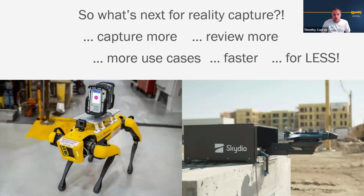If we can track installation progress and not only say the mechanical system is installed 60%, but we can say, hey, of that 60%, 10% have deviations at the warning level, 5% have deviations at the critical level. Then it gives us a better idea as to what is actually billable, and we don't spend money faster than we should, or our burn is actually what it needs to be to sustain healthy progress through the job, and we don't work through all of our budget right at the beginning and think that we're done when we're actually not. So with things like Avvir or Sky Duo or Spot, I think we're all moving in the right direction. It's just now how do we tactfully do this so that we don't make false promises and we actually use the data to everyone's benefit.